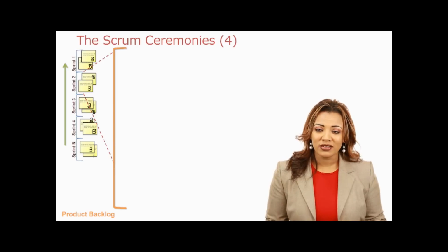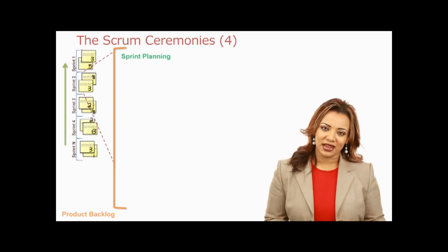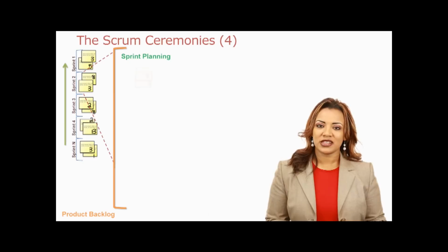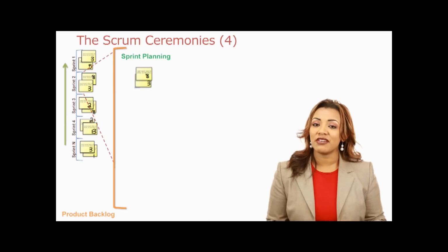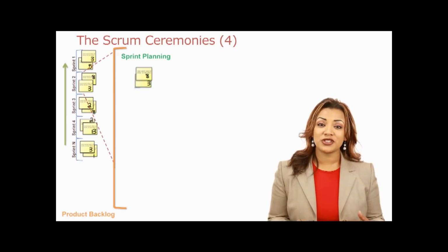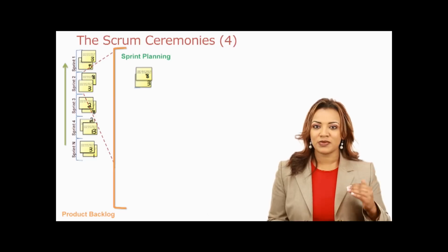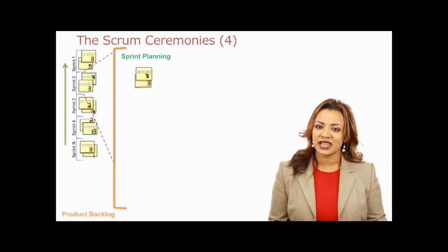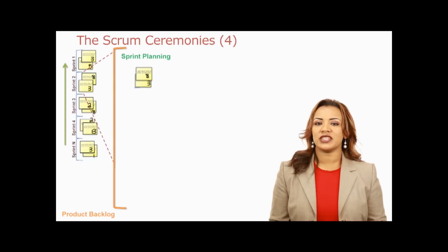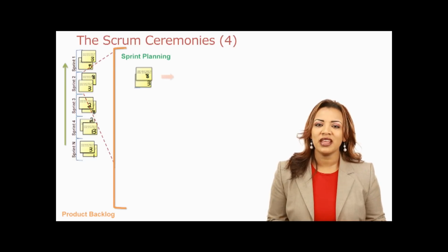Well, day 1 is something called a sprint planning meeting. The goal of the sprint planning meeting is to confirm the priorities that we have for our backlog. So here's the actual stories that the team is going to commit to getting done. Product owner is definitely there to say, yep, this is my top priority. These are the items that I need to get done. Discuss it, talk about it in more detail, and the team makes their commitment to say, yep, I think this is what we can get done, and let's go ahead and break it down into tasks.